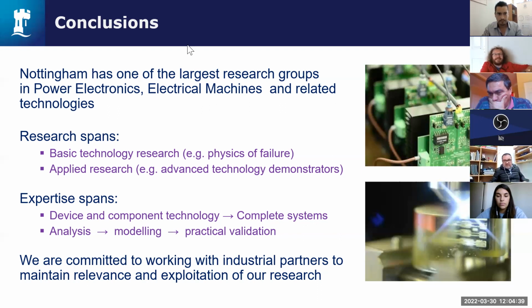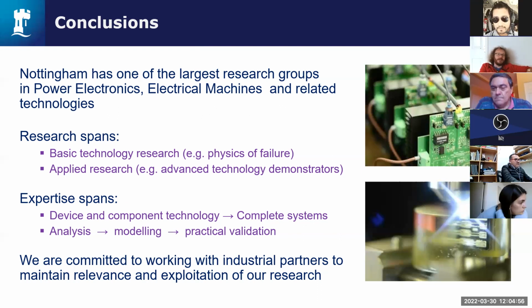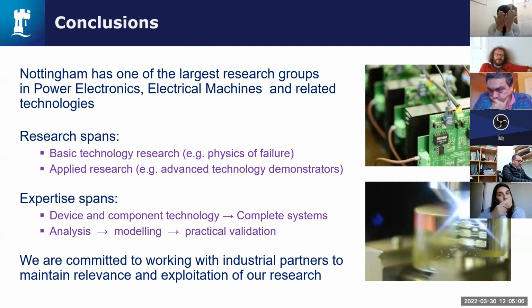Whoa, that's a big question. So when we work on the big European aerospace projects, the current project is 4 billion euros, we have an office of maybe 12 people in Brussels that coordinate that. And they control it because they control the money. The only way you can control big projects is by controlling the flow of money, because it's a very powerful tool. So you have to have professional project planning, and you have to have tight financial controls to get people working in a coordinated way.